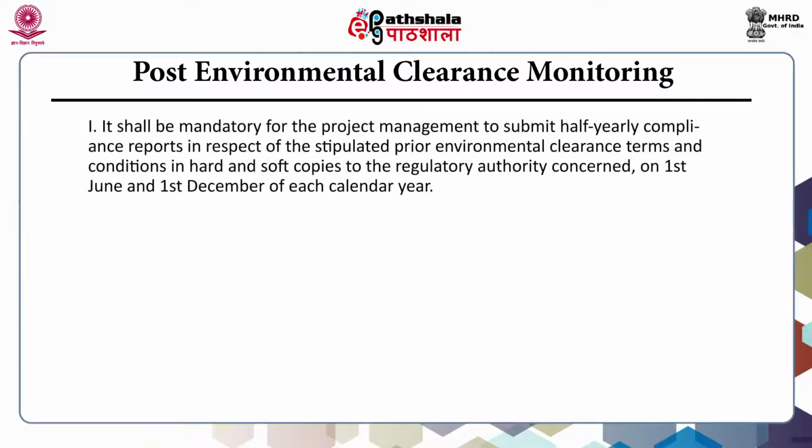Then, post environmental clearance monitoring. As per notification, it shall be mandatory for the project management to submit half-yearly compliance reports in respect of the stipulated prior environmental clearance terms and conditions in hard and soft copies to regulatory authority concerned on 1st June and 1st December of each calendar year.